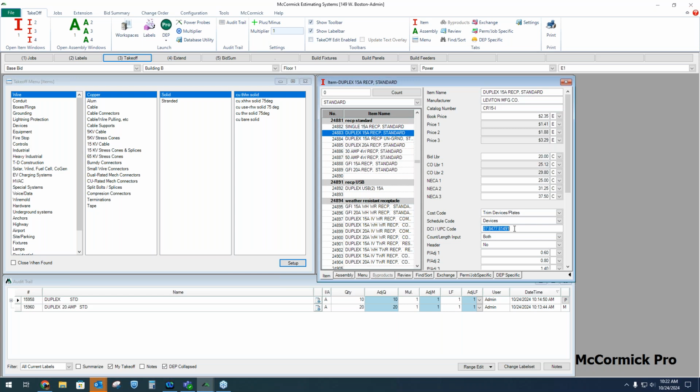Now, on top of that, not only if I'm subscribed to a pricing service like NetPricer or Trade Service, on top of them keeping my database pricing up to date for me, in the next step, I can hit a button and get today's price from my supplier, my price from my supplier, with the click of a button. They call that the supplier link, the supplier exchange. It's like a direct connection, so that on a job-to-job basis I'm able to get today's price from my supplier on my complete list of material. We can even compare supplier prices side by side and cherry pick between them. Again, that happens in the next step.